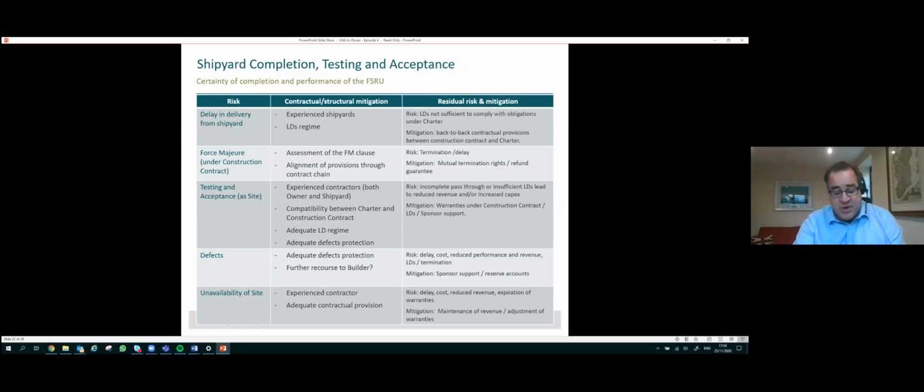And of course, the performance warranties that the FSRU sponsor provides to the project under the charter should be as closely aligned as possible to the performance warranties of the unit as stipulated under the construction contract. So this really is a key element of both the construction contract and the charter. And it is important to ensure that elements such as timing, procedure, and responsibilities are matched as closely as possible between the two contracts.